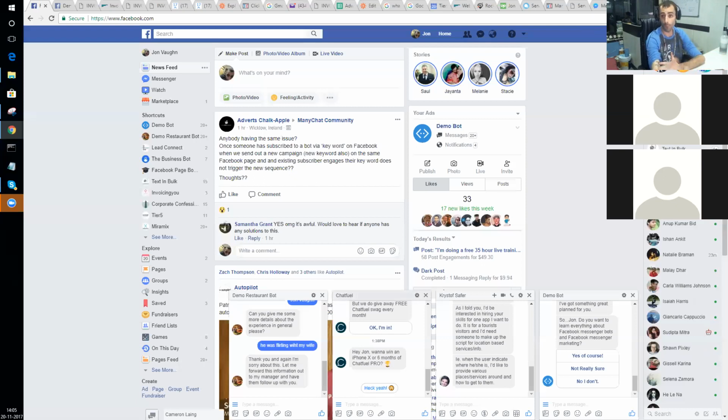It will give you a more refined budget and a more refined time estimate. Before, we had a range of, let's say, 10,000 to 25,000, which is a very common range for a software project, even though it seems like there's a huge gap. Because we use a Fibonacci sequence, which allows us to come up with a best case and a worst case, we know that whatever it costs to build your software will be somewhere within that range.